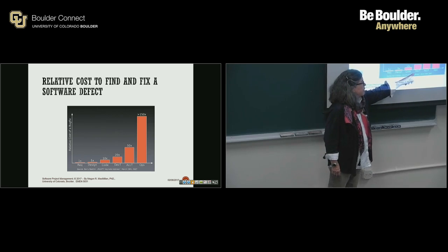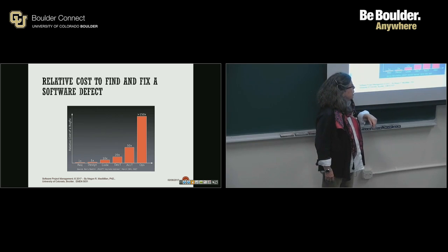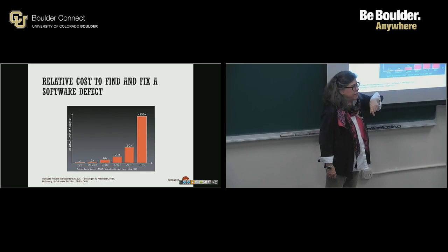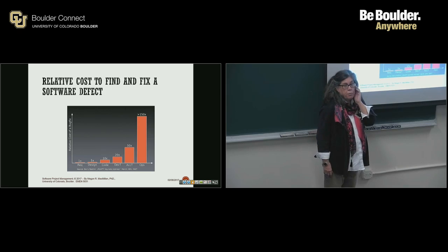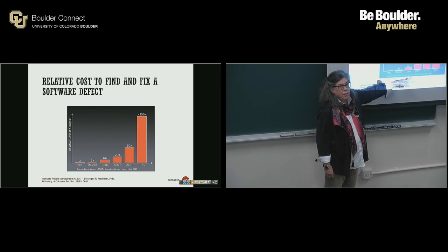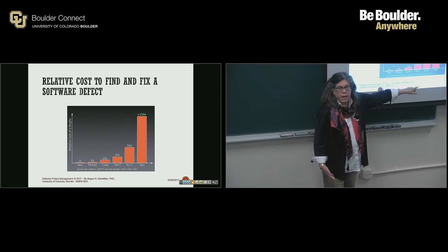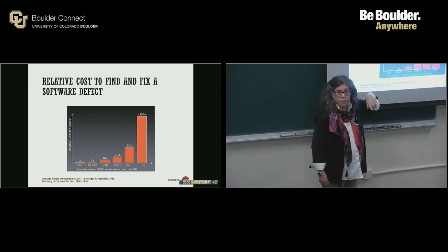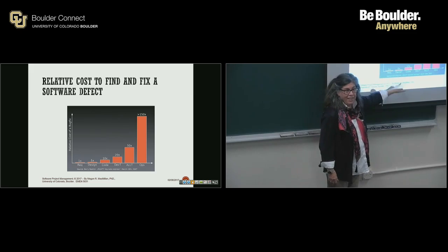Coding, 10 times. In the dev, if you're getting out there in development, it's like 20 times. If I'm getting out into testing and all that, it's 50 times. And if I get it out to ops, if I've thrown it over to production and find that same bug, it's about 150 times or more, depending upon what types of issues arise when I've thrown that bug out there. If I lost that $40 billion, or whatever it was, $400 million for Tesla, it's a hell of a lot more than 150 times if I'd found it back here, right?